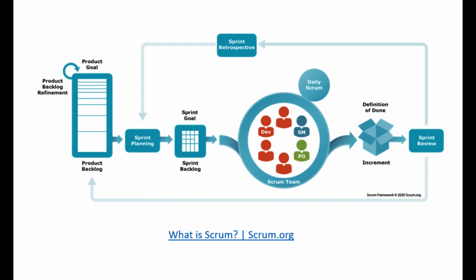At the end of the sprint, the team demos the product increment that they have produced to the product customer and or user. Other stakeholders sometimes attend the demo as well. After this demo, the product customer and or the user provide their feedback. This feedback enables the team to iterate and adjust the work for the next sprint if needed.